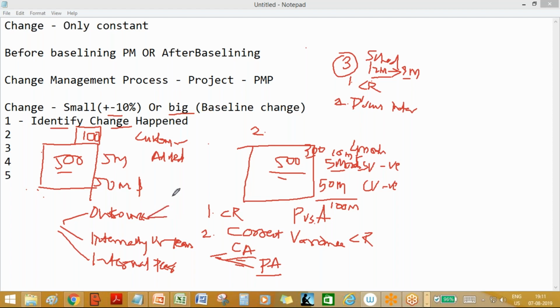For example, if you outsource, scheduling may be faster, so faster delivery can happen because the vendor is an expert in doing this kind of thing, and it may be costlier. Now if you do it internally, maybe it's a little cheaper, but it cannot be done so much faster.